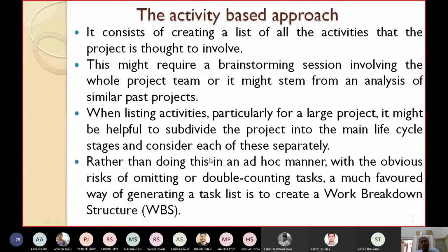As I have already told you, the main life cycle stages might be requirement analysis, then design, then coding, then testing, etc. Then each one you can divide: design can be database design, UI design, code design; testing can be integration testing, system testing, regression testing, and so on. Rather than subdividing the project in an ad hoc manner, with the obvious risks of omitting or double counting tasks, a much favored way of generating a task list is to create a work breakdown structure.